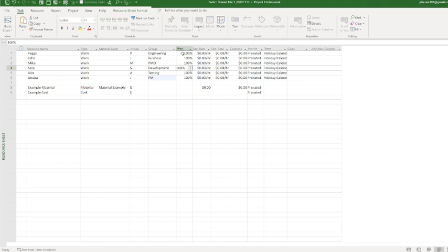Which isn't good because that makes your tool kind of useless, especially if you got to make sure that all your resources have like work-life balance, for example. They're able to meet their deadlines as they're estimating, all that fun jazz. If they're not, you need to be able to see who's being over allocated so that you can make adjustments as necessary. Maybe you need to put another resource towards it to help that person. Maybe you're realizing maybe they're not the right fit and we need to switch resources around, whatever the case may be. But if you hide that by changing that percentage to 1,000, you're not doing yourself a good service.